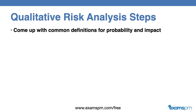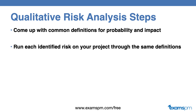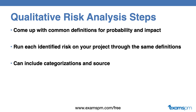Here are the steps to compute qualitative risk analysis. First, we come up with common definitions for probability and impact. Then we run each of the identified risks on our project through the same definitions. We can also include other factors, sources, or categorizations — this particular risk may belong to a specific categorization defined in our project. The qualitative risk analysis will also include the appropriate categorization of the risk, where it's sourced, and the effect.